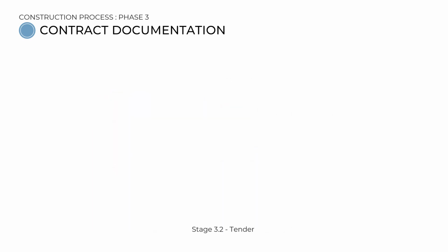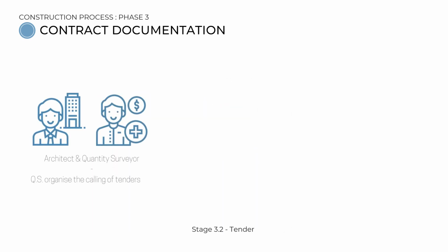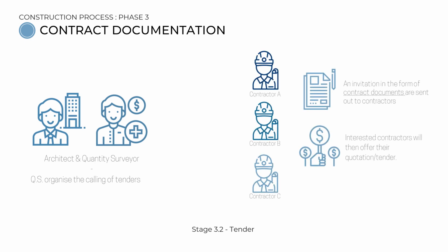The tender process is then carried out by the quantity surveyor and architect. An invitation in the form of contract documentations are sent out to interested contractors who then offer their quotation or tender back to the consultants.